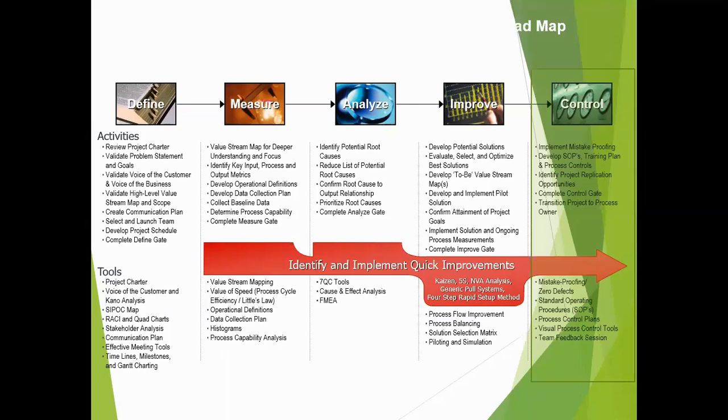Then we try and build a business case at an overall level, which is the business we are going to manage this project for, and what if we don't do this project, what would be the impact of having this project in place. So that's something we list out in the business case, and from the business case we arrive at a problem statement which is more specific. In the problem statement we clearly define from what period to what period, what is the metric.